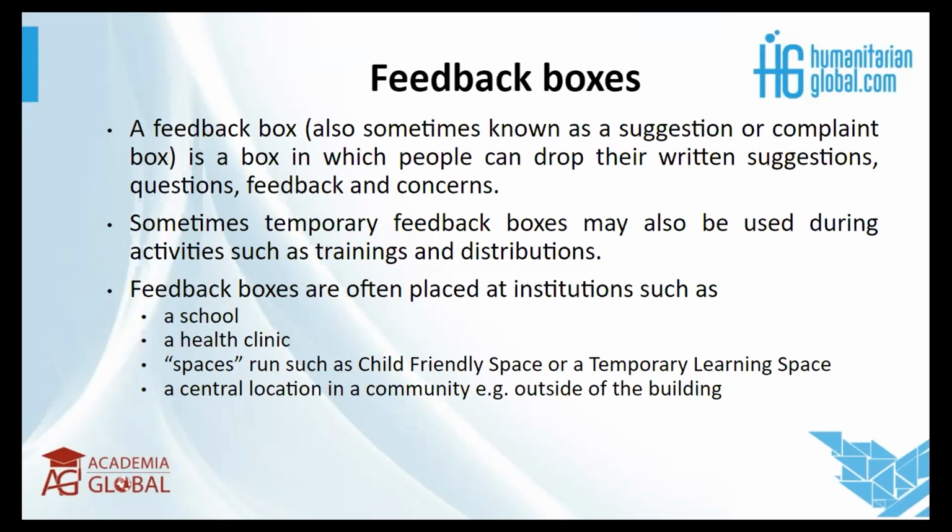In terms of the box, it should also be locked at all times. It should be lockable, and the only person with the key, or able to remove it from there, is the MEAL focal person. And that should also be information that is explicitly said, whether it's in a school, this should be said to the whole forum, to the whole school, so both the teachers and the students should know that this facility is only brought by this organization.